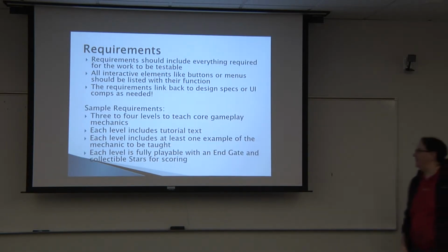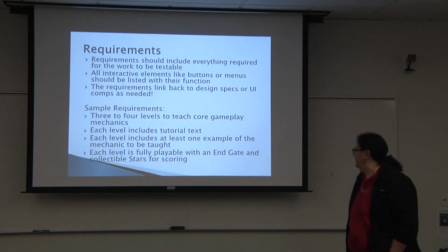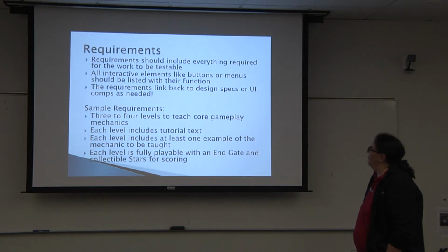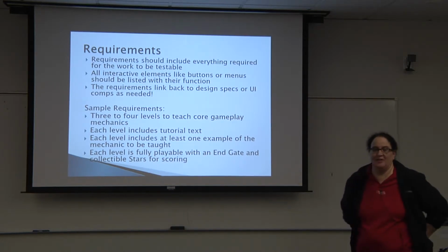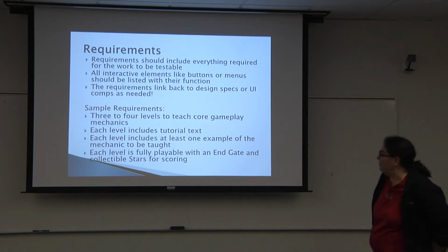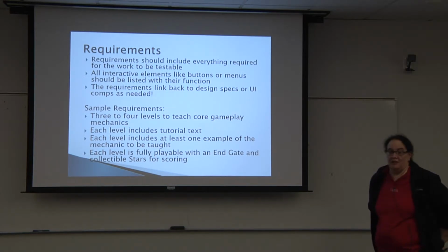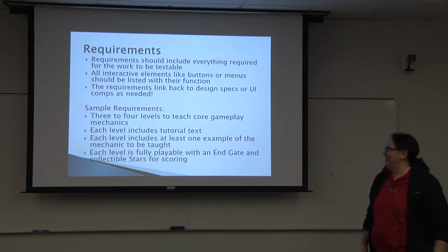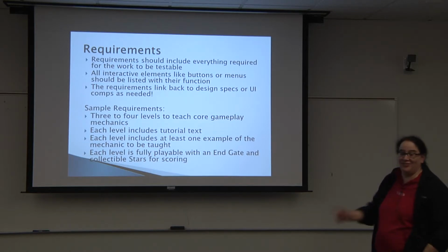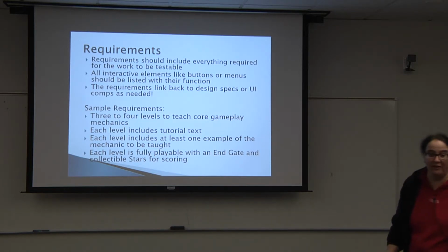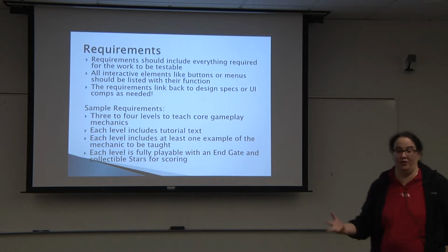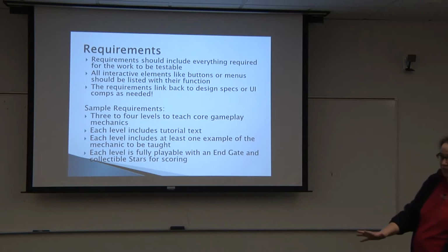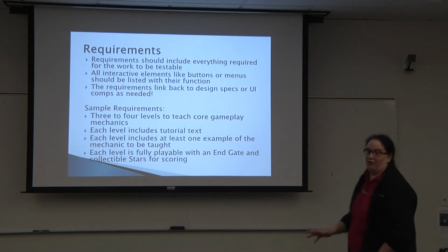So this is getting very, very specific with requirements. But again, this is the testable outcome. So generally, how I approach writing requirements is I don't just sit in my tower and write these in my fortress of solitude. I sit with the person who's going to be doing the work, and I'm like, let's talk through the initial requirements. So that person has an immediate voice in it. They're not the last person to have a voice in it, but they're the first with me.